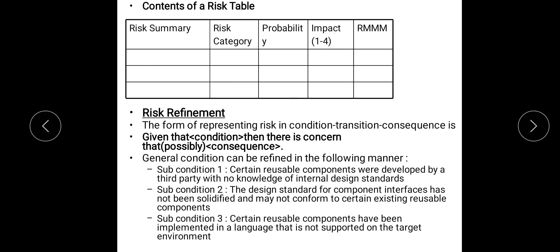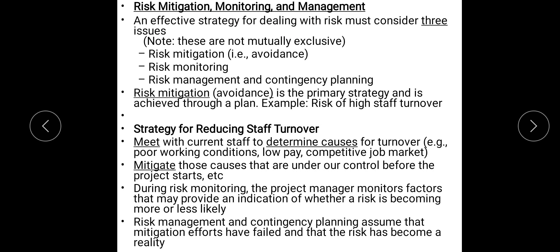The next topic is Risk Mitigation, Monitoring and Management — RMM. An effective strategy for dealing with risk should consider three issues: risk mitigation, which is avoiding the risk; monitoring the risk; and if it happens, how to manage the risk, which requires contingency planning. Risk mitigation means avoiding the risk before anything could happen. Consider the example of the risk of high staff turnover — if all employees resign at once it would be terrible, and so strategies are needed to reduce this situation.